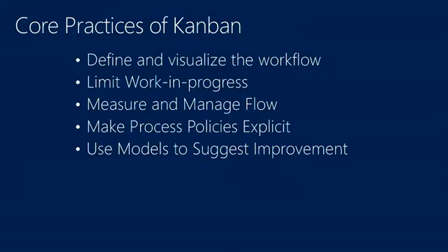But more importantly, and this is the fundamental thing, if you've never studied lean manufacturing or Kanban in particular, we always think we can do things and should do things in batch. So in Scrum, we'll take 10 items out of the backlog. If you listened to my last session, I kept talking about taking 10 story points worth of stuff out of the backlog, working on it, creating velocity, and so on. In Kanban, there's no concept of batch. It's all about what they call flow, and this comes directly from lean manufacturing.